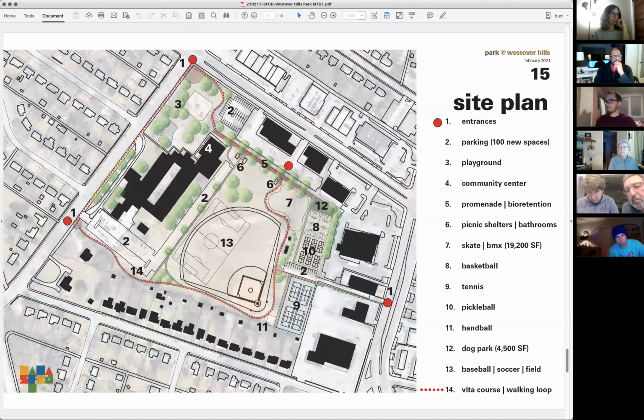Again, there would be more opportunity for public comment in the next iteration of this, and then again at the Urban Design Committee. Once it's settled there, we will put on our advocate hats to try to find the funding for it. Once we have the design pretty much figured out, we can price out what it would cost to do this work. So we'll have a rough budget amount of what it would take after this design process is concluded. Then from there, we'll work with your council member to see how we can be best advocates for getting that included in the budget. I hope I answered that question. I think so.